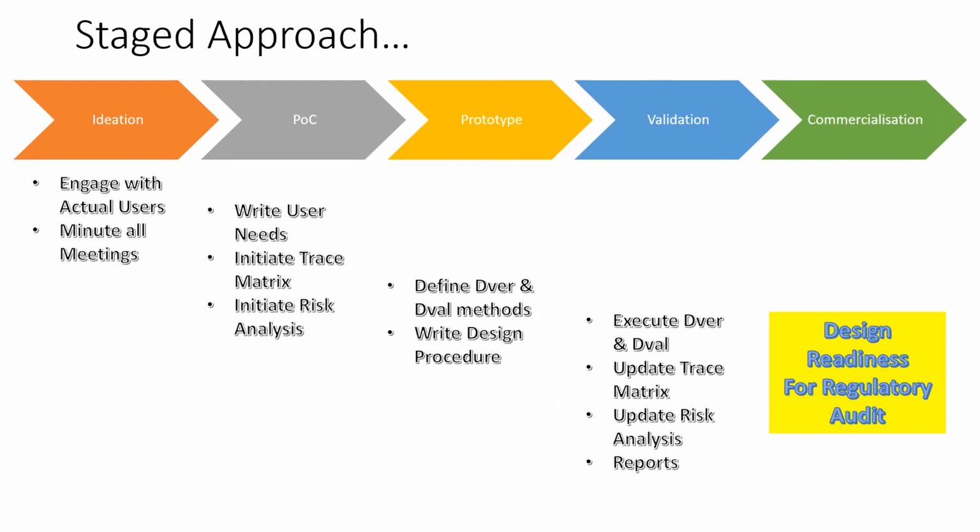So the typical phases that we follow from a startup perspective are ideation, proof of concept, prototype, validation, commercialization. And what one can do is, here are the must-dos. At ideation stage, make sure that you are actually engaging with actual clinical users. It's not restricting yourself to just the ideation team, but making sure you engage with actual users and writing down, minuting, and documenting all the inputs that you get from users.